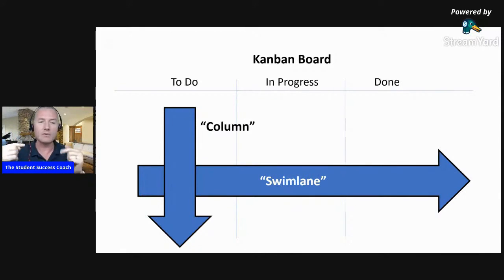So Sunday night, I would send an email to my supervisors as a weekly status report. And again, in that email was a Kanban board. And I had a section in there that says, right, this is what I've done last week. I don't give them all the detail, just the top 5 tasks. Then this is what I commit to doing next week.